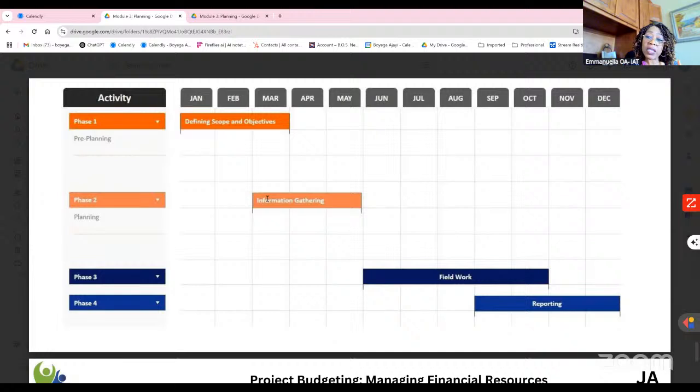Going back to the case study we're doing with the apps, your regulatory people, for example: one task is to submit the application, another task is to review the application, and another task is to get approval for the application. So the application is going to take 5 days. You put it there. Application has to be submitted January 16th, and the duration is 5 days.